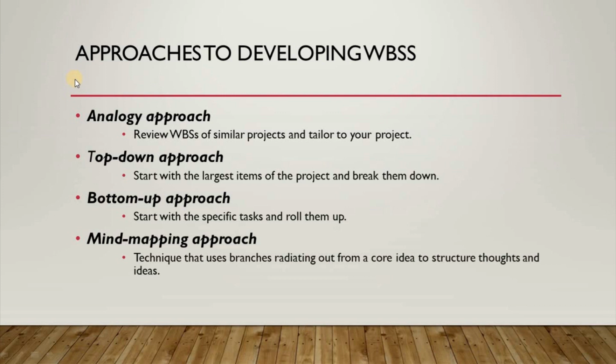Approaches to developing work breakdown structure. Analogy approach. This might be very helpful. If you have a similar project, you would tailor it to your project. That is simple for you to break down based on your past experience. Top-down approach. This approach states that you need to take the biggest task or module in the project and break them down. It requires more logic and structure, and generally it is a preferred method for creating work breakdown structure. This approach will identify the solution first and then dissect the solution into smaller steps required to implement it.